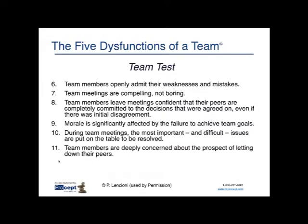Team test eleven: team members are deeply concerned about the prospect of letting down their peers. People in more functional-area organizations tend to be concerned about their department and role there. The more you move toward a projectized or strong matrix organization, the more you see team members being concerned about whether they've let down people on the project team — and less so about how they're viewed by their functional manager. This reflects where you are on the organizational spectrum.